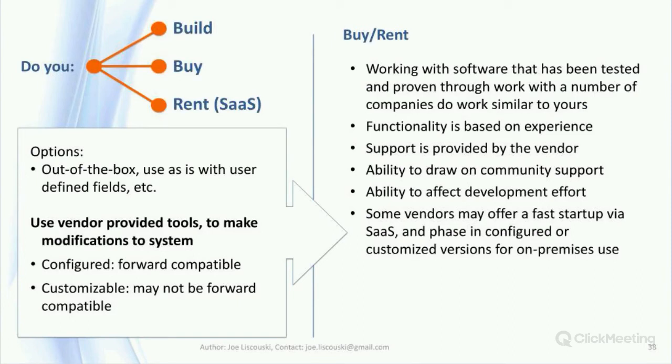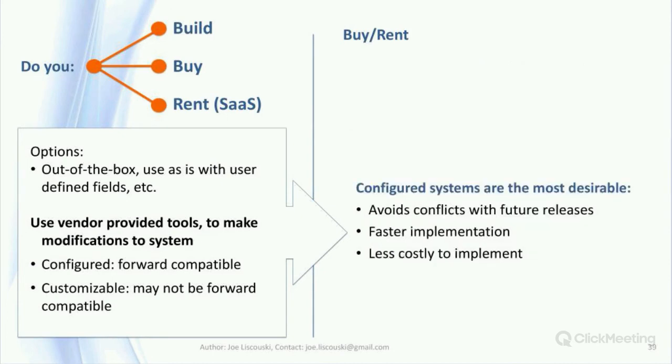How fast you can put the software into practice depends entirely on the preparation you've done in understanding the technology, how it relates to your lab's work, the development of user requirements, and keeping your lab apprised of available products. If you haven't done any of that, you're looking at potentially a year or two's effort. If that work has been done, you should be able to get up and running quickly, particularly if the vendor has a software as a service option that can be moved later on into an on-premise system if that becomes desirable. The biggest issue you're likely to face is the choice between configured and customizable systems as shown on the left.